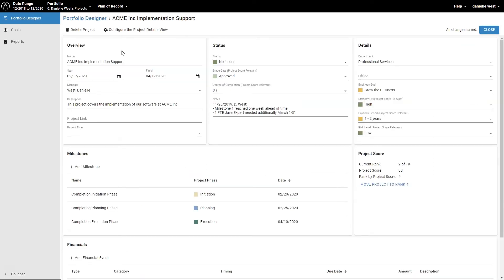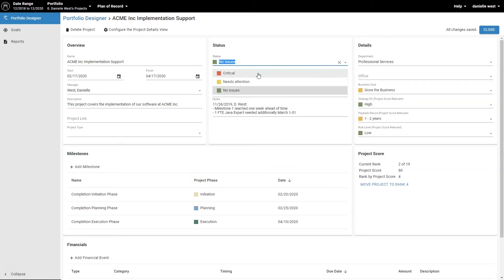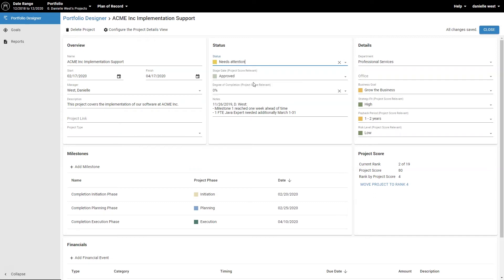Choose the status of your project. For example, red for critical, yellow for needs attention, and green for no issues. This lets the portfolio coordinator know which projects need attention.